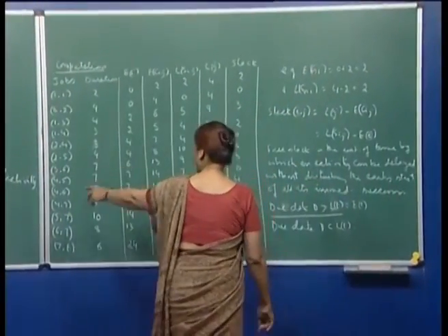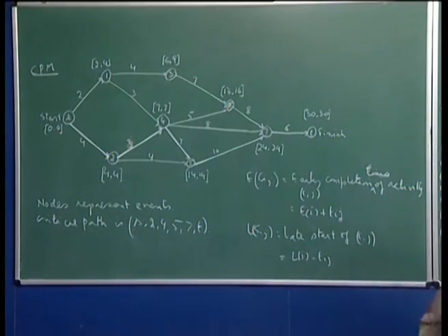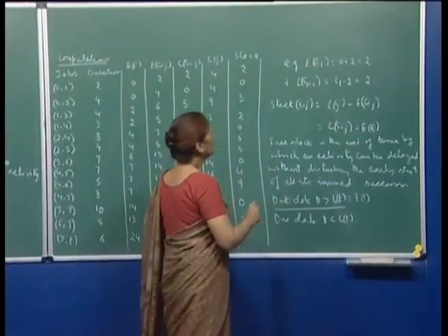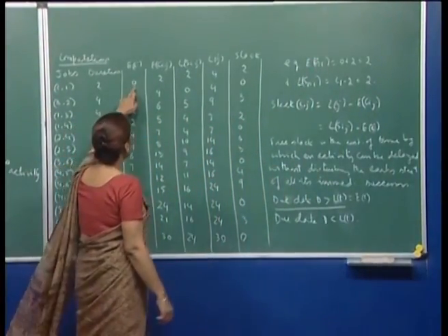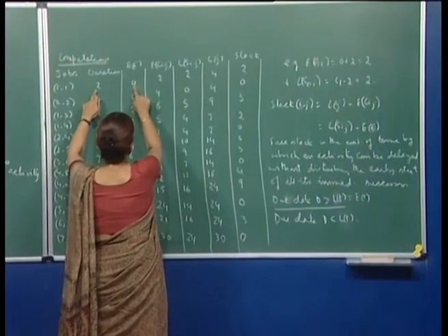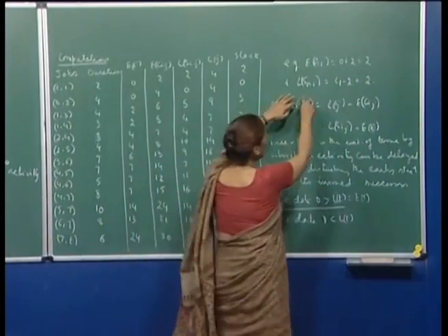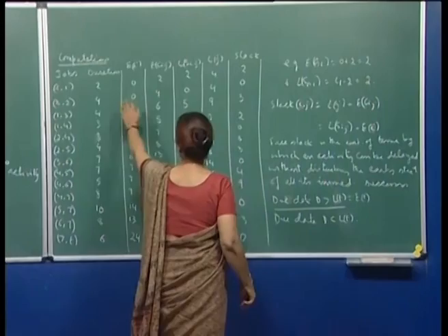If you want to get a feeling for these numbers, for example, I am computing this here. The early completion time of activity S1 will be the early start plus the duration 2. So, this is ECij, and similarly the late start would be L1 minus 2, because L1 is for S1.